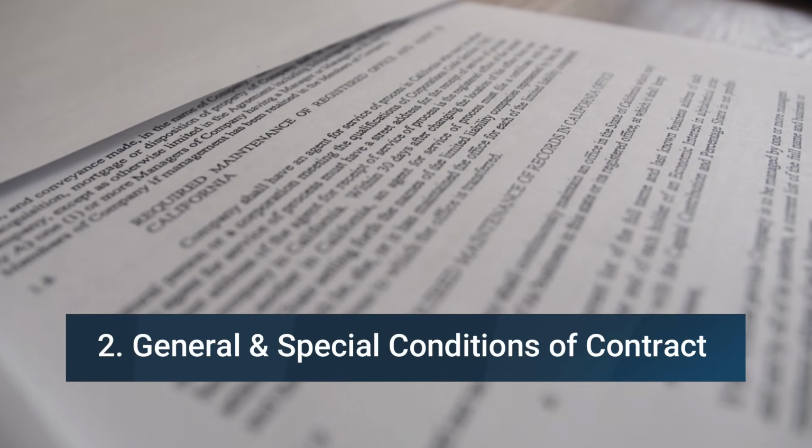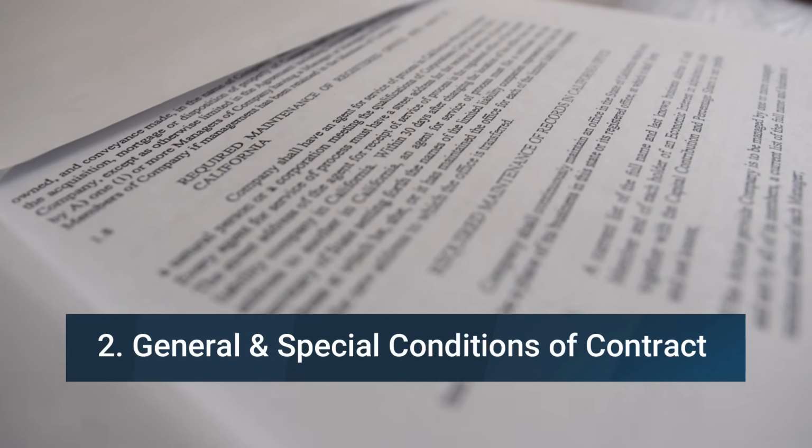Then sitting above the actual definition of the work, we have the rules, which is how each party is meant to act. This is defined by our general and special conditions of contract. Some contracts will be standard form like AS 4000 in Australia or the FIDIC international contracts, or companies may develop a custom specific one for a project.